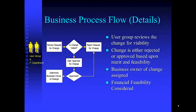The user group and IT department review the change for viability. The change is either rejected or approved based upon merit and feasibility, and they assign a business owner of the change. Financial feasibility is also considered — if a change takes hundreds of hours but will only save minutes per year, it typically gets rejected.